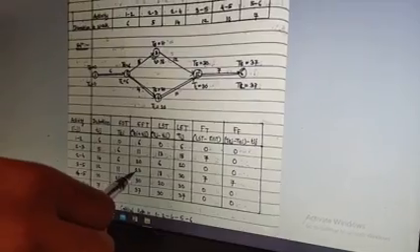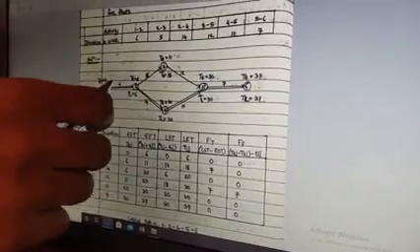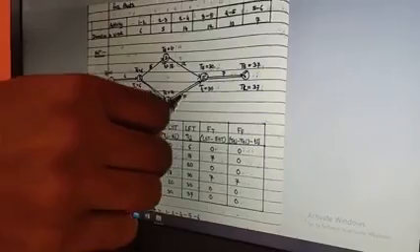So now let us go for the next one, that is 3 to 5. For 3 to 5, the answer I have written is 23. So how has this 23 come? Again, it is very simple. Already we have got 11 in our previous calculation, 6 plus 5. Now to this number, if I add the duration of this activity 3 to 5, that is going to be 23. 11 plus 12. Now let us go for the next one, that is 4 to 5. For 4 to 5, I have written 30. Again, how has it come? It is very simple. 20 we have already got in our previous calculation. 20 plus 10 is going to be equal to 30.